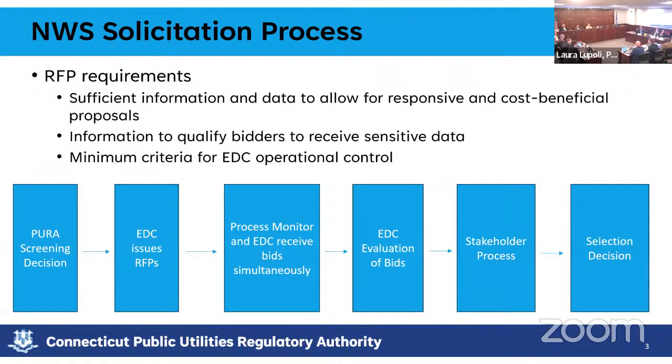If I could add, at least in our cross-jurisdictional scan, it was a bit of a spectrum. For instance, in Hawaii, they released what they called the non-cost components of the evaluation criteria. So they didn't reveal to the bidders how much the cost would factor into the bids. But it provided some more transparency on how they should craft their proposals, and it did result in some better proposals.